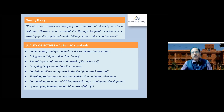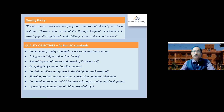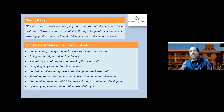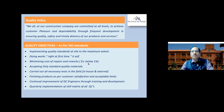Some important quality objectives: implementing quality standards at the site to the maximum extent, and doing works right at the first time — not doing any rework. Whatever work we do should be to quality standards and we should not go for rework. Minimizing cost of repairs and rework — unavoidable circumstances may cause rework, but there is a limitation. Below one percent is acceptable; if it goes beyond two percent, the project is not planned properly by the professionals.